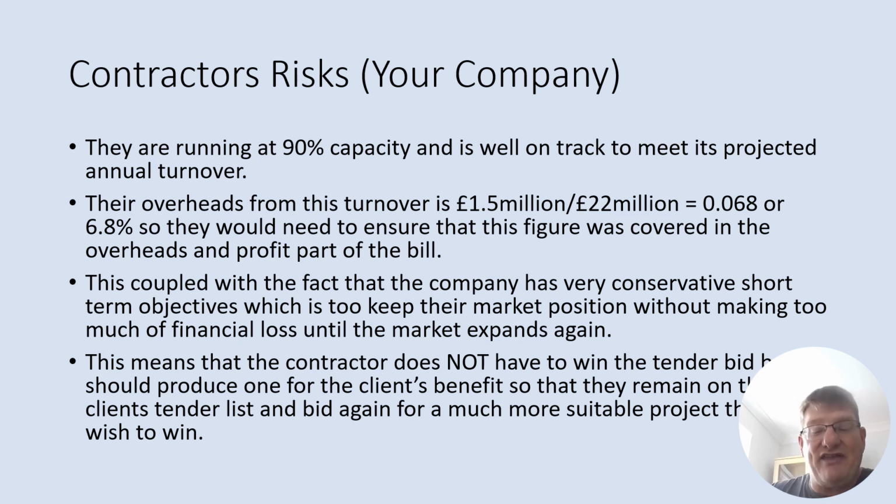So as I say, that coupled with the fact that you're on quite a good financial standing at the moment, and the fact that your short-term goals are really survival, if you like, keep your market position in the locality. All right, you probably might not want to win the contract, to be honest with you. So you might use a strategy where you actually produce your bill of quantities and add on quite a large percentage for overheads and profit. You might still win. You see, your reputation might actually get you through.